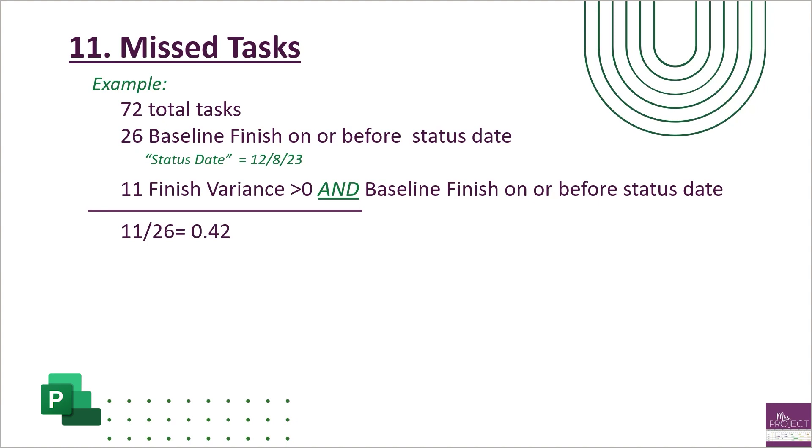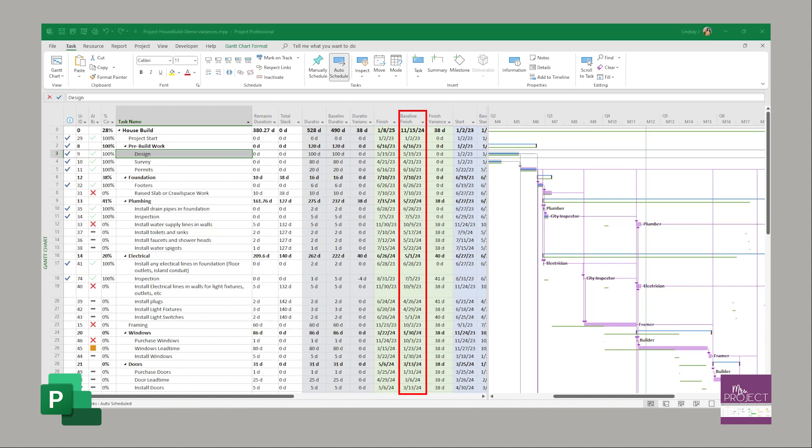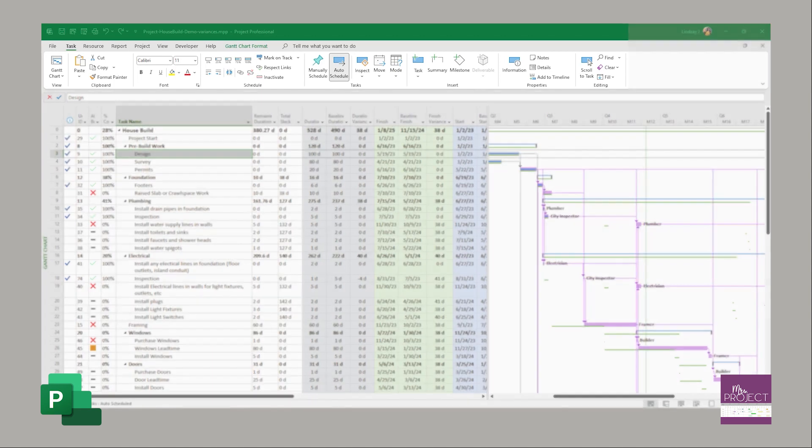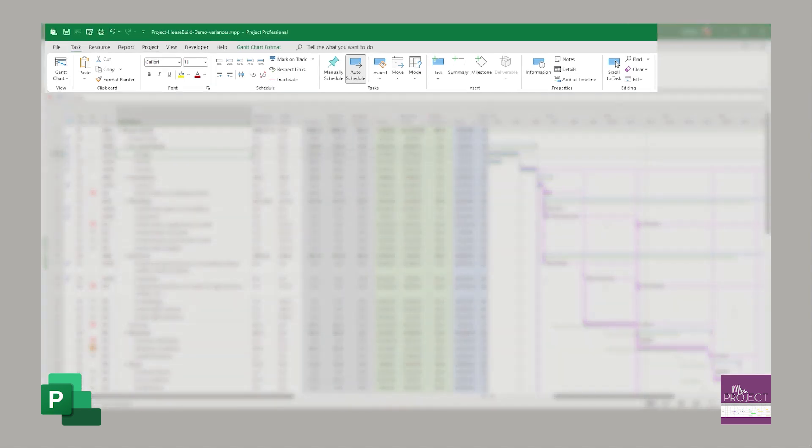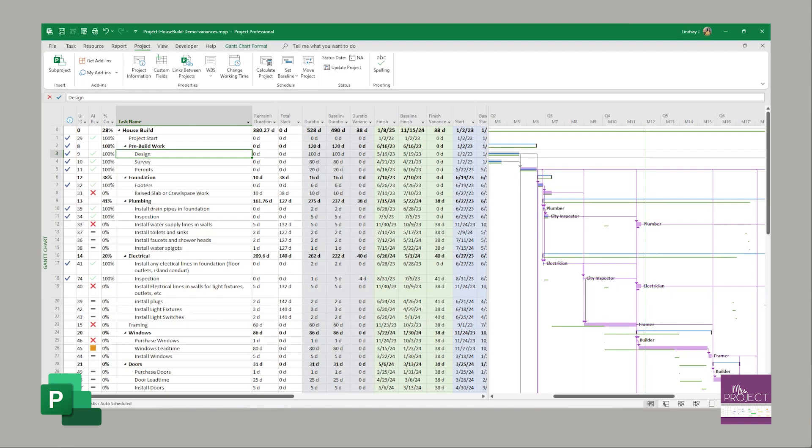Here's what it looks like in Project. You're going to have your finish column open, your baseline finish column open, and your finish variance - these are the three that you need to look at. Now we're also looking at what is our status date. You could go up to Project to find what the status date is. In this situation it's NA, which means Project is using your current date as that status date. If you were to use your mark on track feature, it's using today's date.